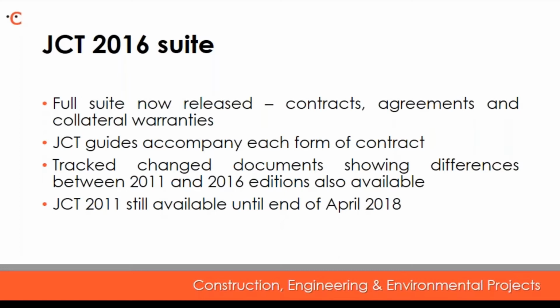JCT 2016 supersedes JCT 2011, but JCT 2011 will continue to be available during a transitional period. From April 2018, the JCT 2011 contracts will no longer be in use in any format. As a firm, we are already using the new contracts for clients on projects presently being procured.